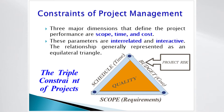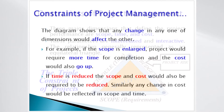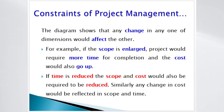The relationship is generally represented as an equilateral triangle. It is evident that any change in any one of the dimensions would affect the others. For example, if the scope is enlarged, the project would require more time for completion and the cost would also go up. If time is reduced, the scope and cost would also be required to be reduced. Similarly, any change in cost would be reflected in scope and time.